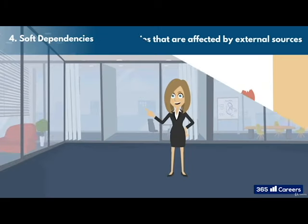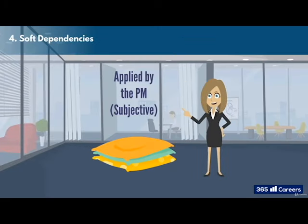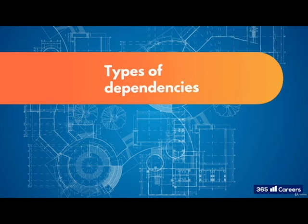The fourth are called soft dependencies. These are applied by the project manager themselves, and could include things like a task not going forward, unless the project manager has checked the previous task. They are called soft dependencies as they are easily amendable, due to the fact that the project manager set them in the first place. Now, let's have a look at the types of dependencies. Four, again, is the magic number here.